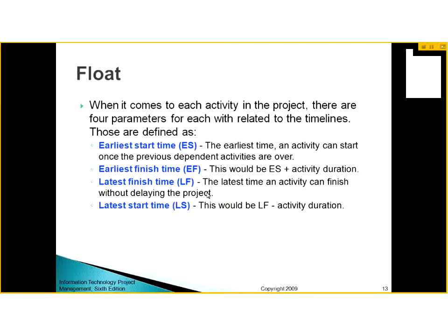Earliest finish time will be the earliest start time, which is ES, plus activity duration. The latest finish time is when an activity can finish without delaying the project. So you are performing an activity, and how much you can delay this activity so that your project finish date is not delayed.